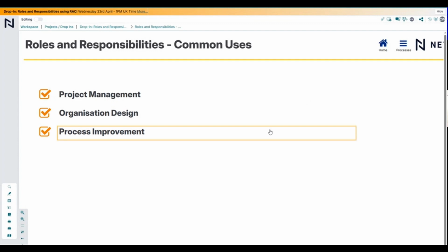I had this comment made to me a couple of weeks ago, that using UPN in Spark itself is pretty good for mapping out projects, regardless of whether it's something you're going to use repeatably or not. Because UPN has the ability to break processes down hierarchically very easily. It mirrors quite closely a work breakdown structure. So if you use that type of approach for thinking about the work in a project, it lends itself to that quite nicely.